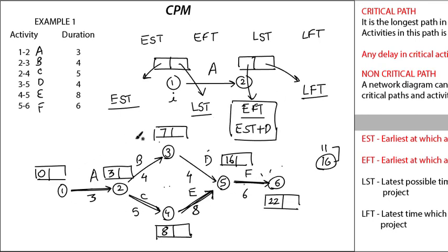See, for this project to get completed we need 22 days, right? So the latest finish time of activity F will be what? 22 days. Max to max it should be completed at 22 days. Now in forward pass calculation you added the numbers, in backward pass calculation you will subtract the numbers.